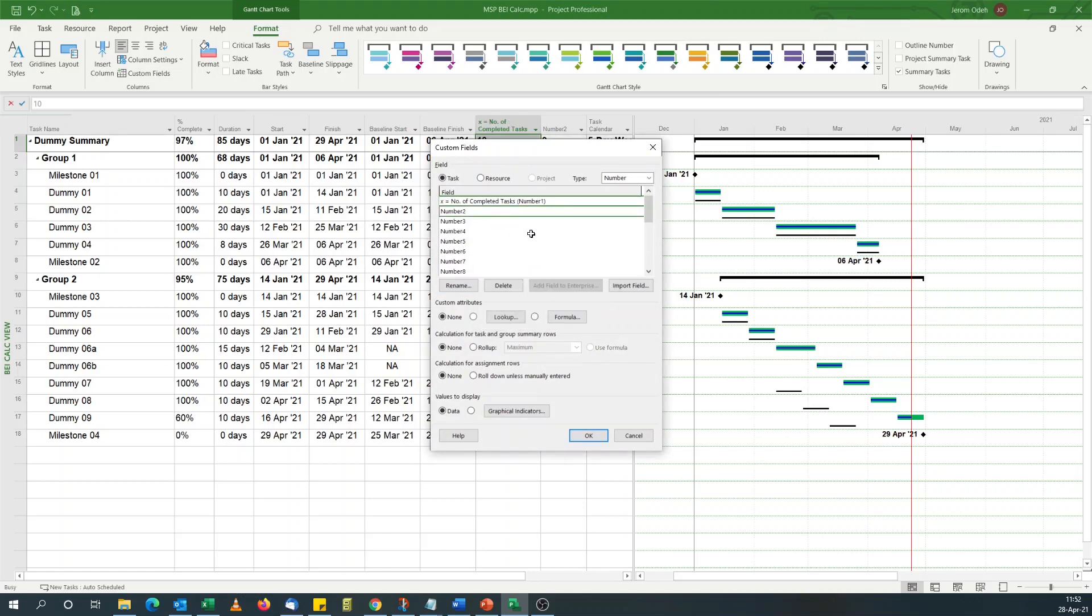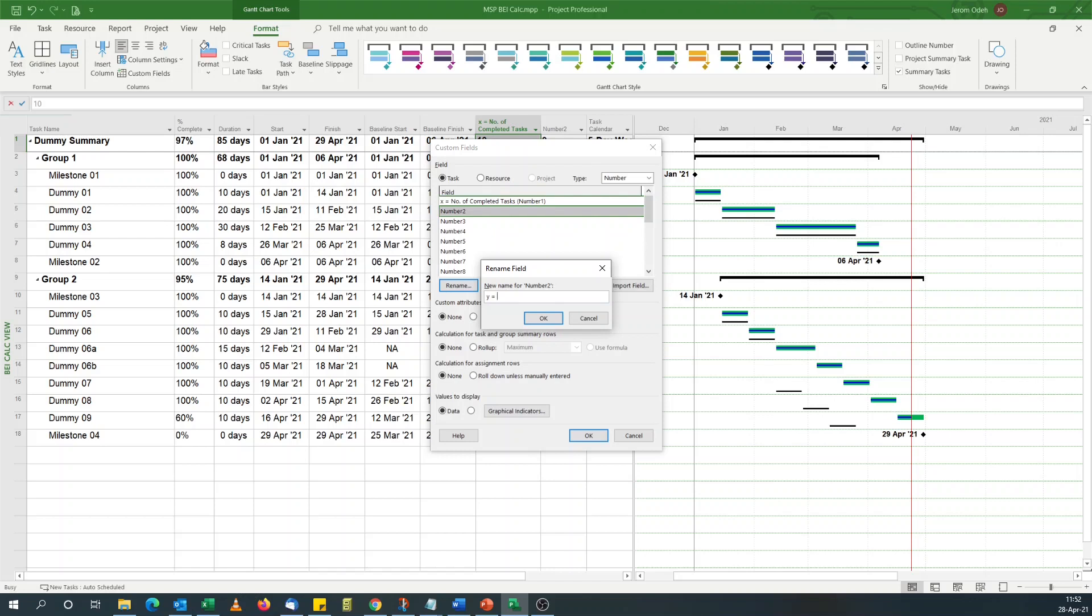For a new column we name it Y equal to... Not 100% complete and baseline finish less than or equal to status date.